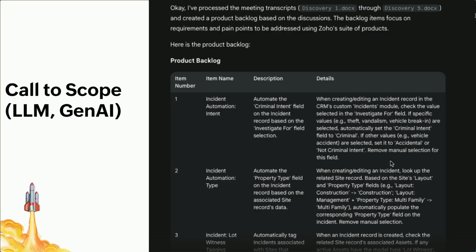So anyway, the first step, like I mentioned, is taking meeting transcripts and creating a backlog. For those that have worked with partners, those that have done any project at all, you'll understand you'll get a huge 5-hour discussion. You can take your meeting transcripts and put them into the AI. It'll analyze the 5 hours and get context over the 5 hours. You give it context of who you're working with, and it'll produce these backlog items. And for us in implementation, the backlog items are the truth. They are what a customer wants and what they have agreed to in the scope of work.